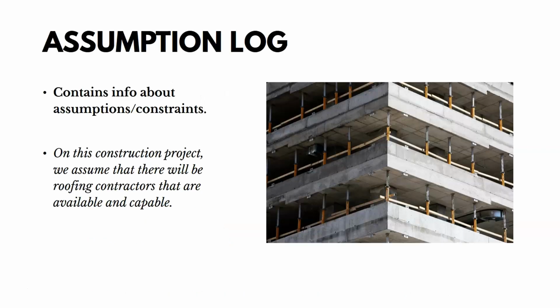In addition to the project charter, one output is going to be the assumption log. It contains info about assumptions and constraints. Here's an example of an assumption or a constraint. On this construction project, we assume that there will be roofing contractors that are available and capable to work on the project when we need them. That's an assumption we're making.